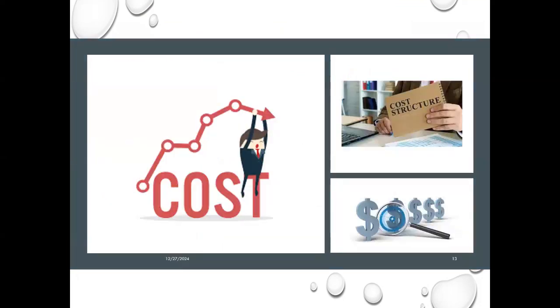Cost: let's say I'm a quantity surveyor, for example. My question: does Primavera help me to do project budgeting? Answer is yes, very, very accurately, because in Primavera you can create a resource breakdown structure, which is called RBS. You create a resource dictionary, each and everything in terms of manpower by category, material, and machinery. Then you can assign the cost. For example, one labor,